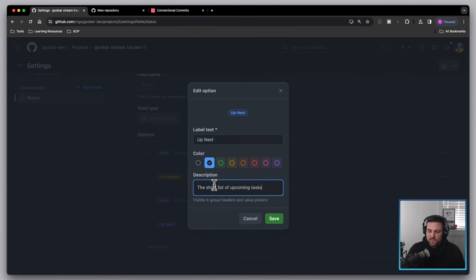It worked. We didn't select the project, but once we created the issue, our automation kicked in and automatically added it to our project. Notice that it added to the project but has no status initially. From the issue I can select a status, or going to the board itself, any issues added without a status show up in an extra column. I can come in and move it into the to-do status, and back in the other window we automatically see it's been marked as to-do.